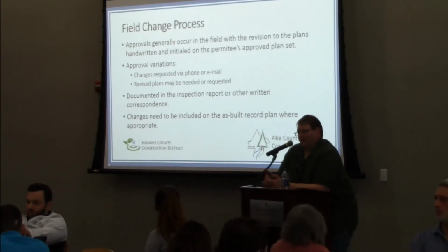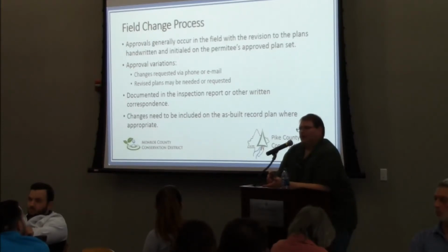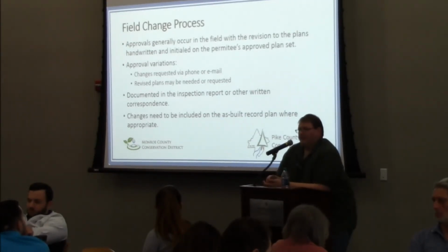Now, to talk about your question about whether or not you can swap areas is basically what you're saying. It's not a swapping of area. You have your limit of disturbance, which is a number that's tied to a plan. That number is tied to that plan, so you can't just be swapping areas out. That may have been allowed in the past, but under the new guidance that's been put forth, you can't swap out areas. It's a straight, no limit of disturbance increase for field changes.